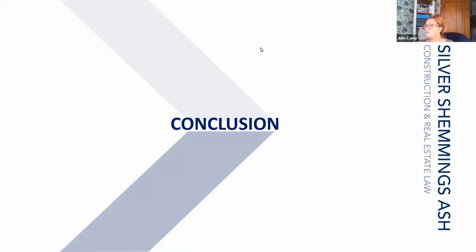Okay. Someone else is asking, what is specified default and insolvency? Okay, so specified defaults are generally defined under the construction contract. There'll be various events, like I said earlier: failure to progress the works regularly and diligently, failure to carry out the work, or failure to adhere to the CDM regulations. Another example is where the contractor may have carried out works which are not in accordance with the contract. Those are specified defaults.